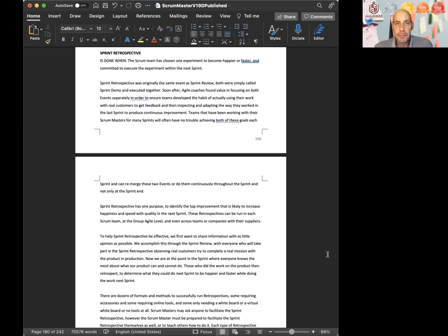Okay, the second part, sprint retrospective. This happens right after sprint review, and it's where we choose how are we going to have a faster, more fun, higher quality, more valuable release, next release, which we would call sprint. How's our next sprint going to be better, faster, cheaper, more fun? And we do it right after sprint review because this is the point we know the most. The developers have just seen the customer use the last increment. They know the very most at this moment.